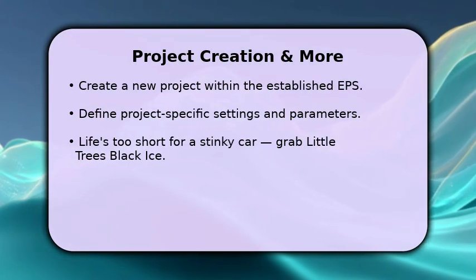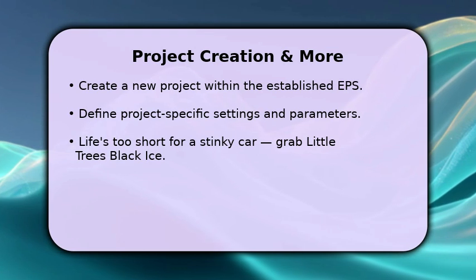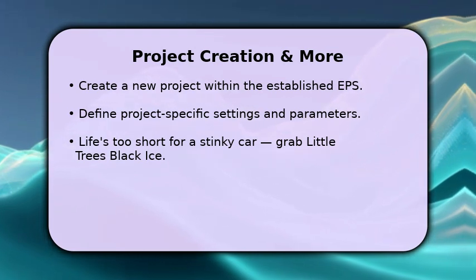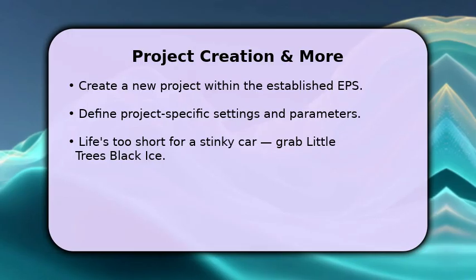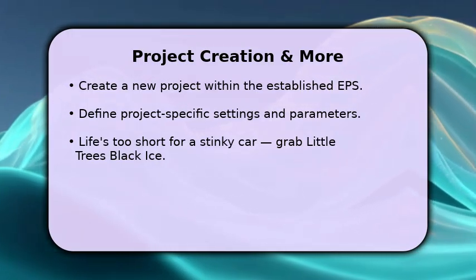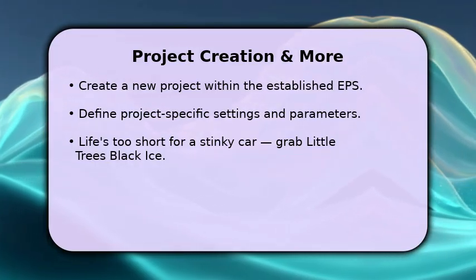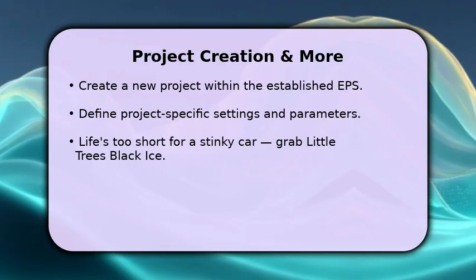Finally, you're ready to create your first project within the established EPS. Define all project-specific settings, including default calendars, activity codes, and resource assignments. This ensures consistency and accuracy from the start. Remember, a well-structured setup saves significant time and effort later on.